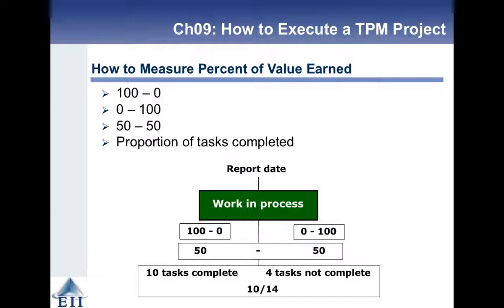I talked about earned value during last week's lecture, and the key piece is there's really a few ways to capture earned value. My recommendation to you is that you are not allowed to capture earned value from a task until the task is complete. Right? There's other ways to do it. You can say, okay, the task is X% done, and that means you're allowed to capture X% of the earned value. That's another way of doing it. Or you can quantize the task. So you're not allowed to capture any value until the task is 50% done, say, or 25, 50, and 75% done.